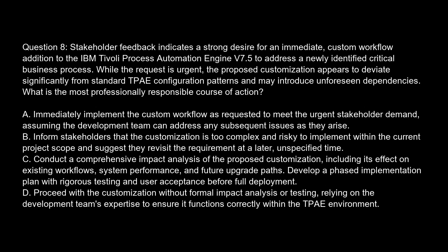Option C. Conduct a comprehensive impact analysis of the proposed customization, including its effect on existing workflows, system performance, and future upgrade paths. Develop a phased implementation plan with rigorous testing and user acceptance before full deployment. Option D. Proceed with the customization without formal impact analysis or testing, relying on the development team's expertise to ensure it functions correctly within the TPAE environment.